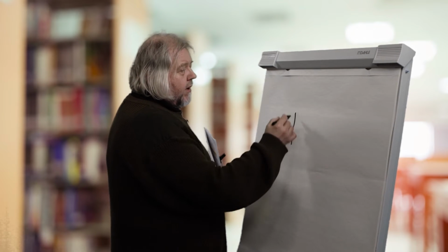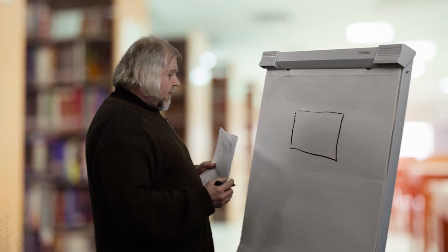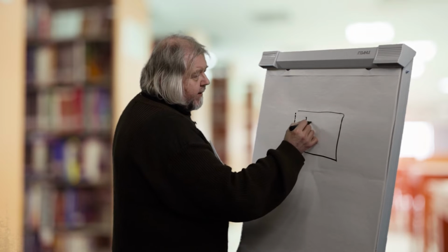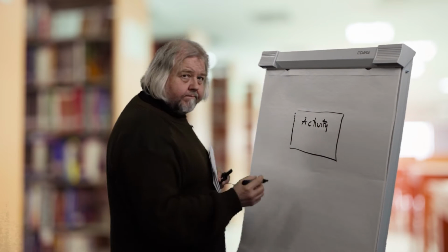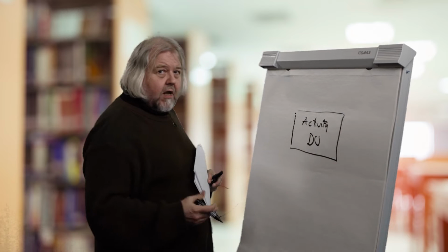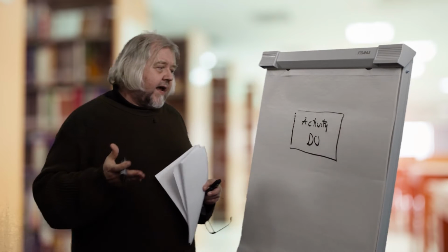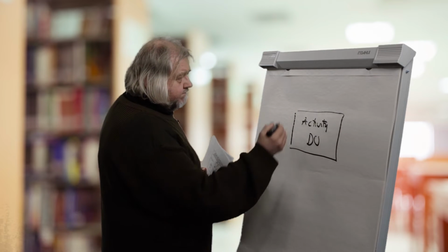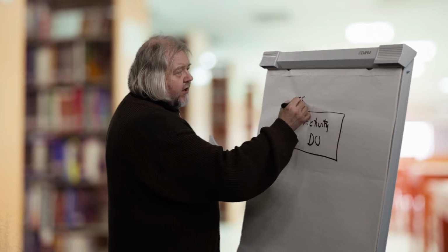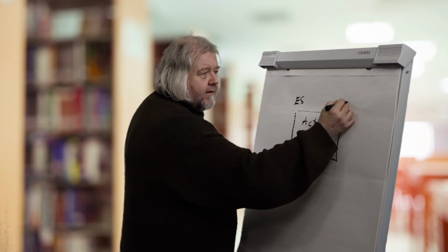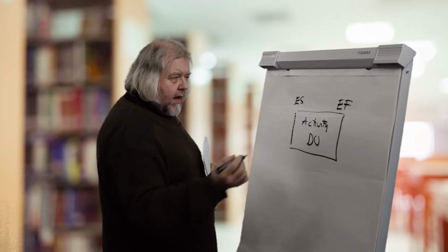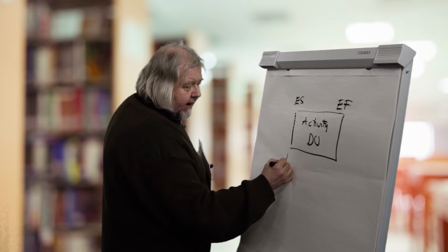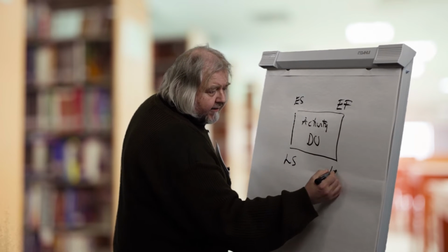Okay. Well, we use the following notation for an activity. Activity is marked on a node. And we have here the activity name, and then we have duration, for example, duration in minutes, in days, in weeks, or so. Then we have here the early start and early finish. And then we have this activity's late start and late finish.